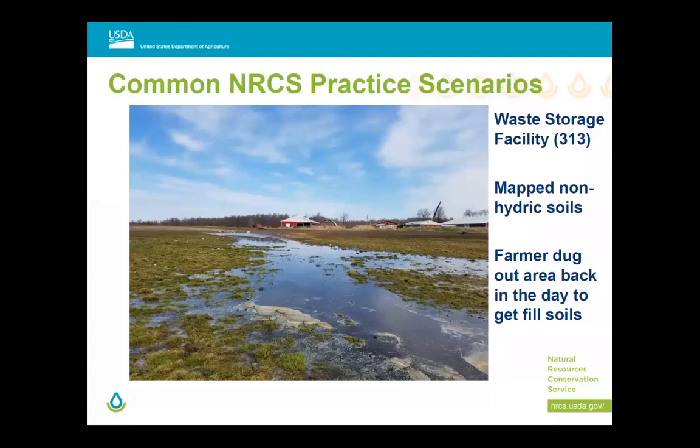of permits. Some, if the impact is under a certain amount of square footage, is considered a non-reporting permit. So you wouldn't even need to notify them of the actions as long as you met all of their criteria of that permit. And then they have ones that over a certain threshold of square footage impact are considered reporting permits, where you need to make them aware of the project. They may require notification before construction and notification after construction, and have the legal right to come out and take a look at it. And then after you exceed other thresholds, they're going to require that you submit a permit application to go through a general permitting process.